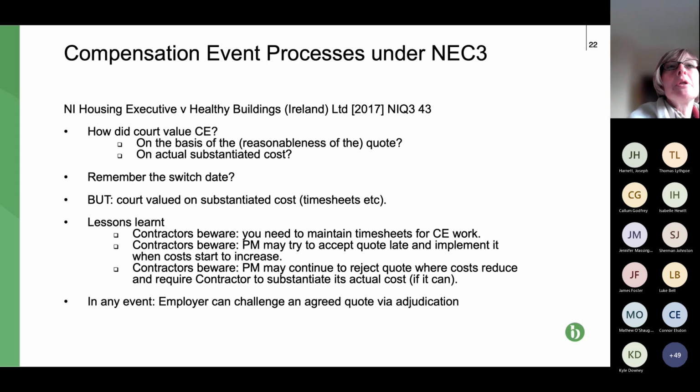Whereas if you can go along to a negotiation with the PM and say, well, you've assessed this at £200, my quote was 26,000, but here are the actual costs, and it actually came in at 25,000 or 20,000, you're showing that you've got that leverage and that ability to proceed to adjudication. Without that documentation, the PM knows that you don't, and therefore will have very little incentive to increase whatever they've assessed and whatever's been paid. So just bear that in mind, please.